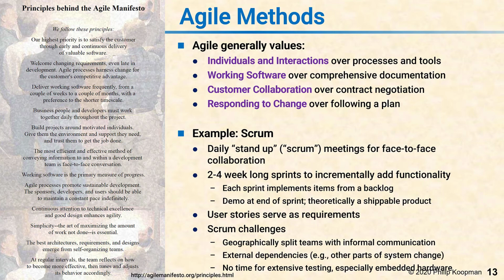By far, the biggest challenge with an Agile approach is that there's no time for extensive hardware-based testing at the end. There's a general presumption that all the tests are mostly automated or can be done in a very short amount of time. You only have 2 or 3 weeks, and that includes the testing. So they work best when you can automate or have very simple tests, but when tests involve setting up real hardware, loading in the software, and then running a bunch of physical tests on a piece of hardware, it can be a real challenge to fit that into a sprint.